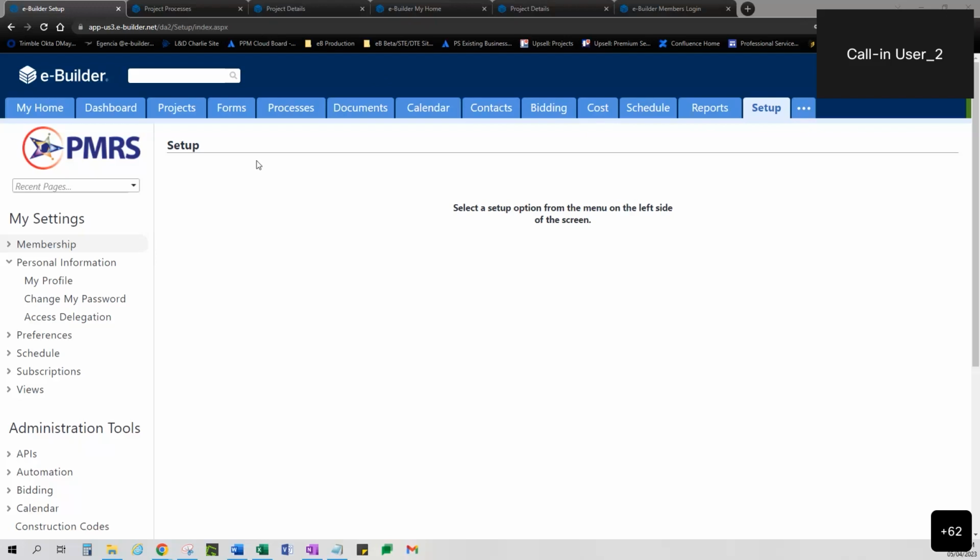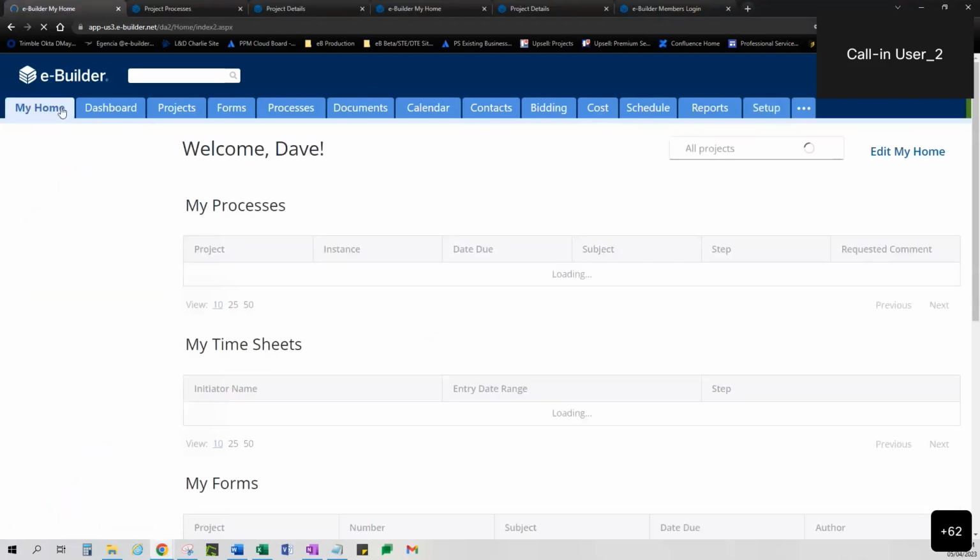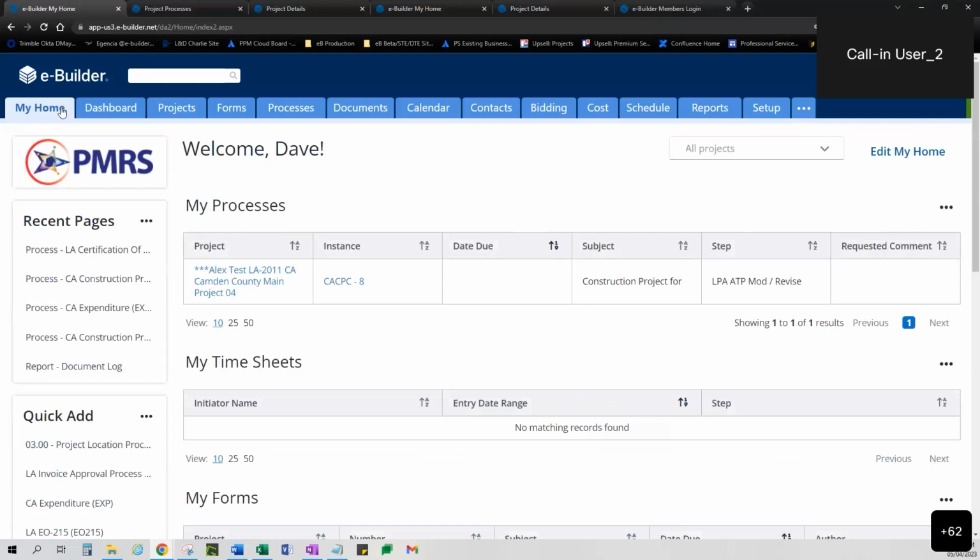So the process LAAE, which stands for Local Aid Resolution Submission and Agreement Execution Process, is where you will need to submit the application resolution within 30 days of submission of your application. That process is automatically created. Please search for that process within the project, how David had earlier walked us through. So you don't need to create another LAAE process. It will be there ready for you to pick up and then submit the resolution.